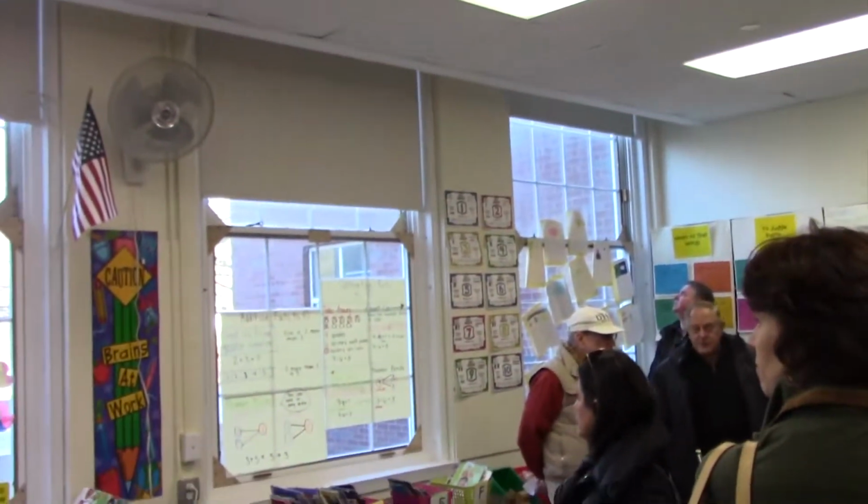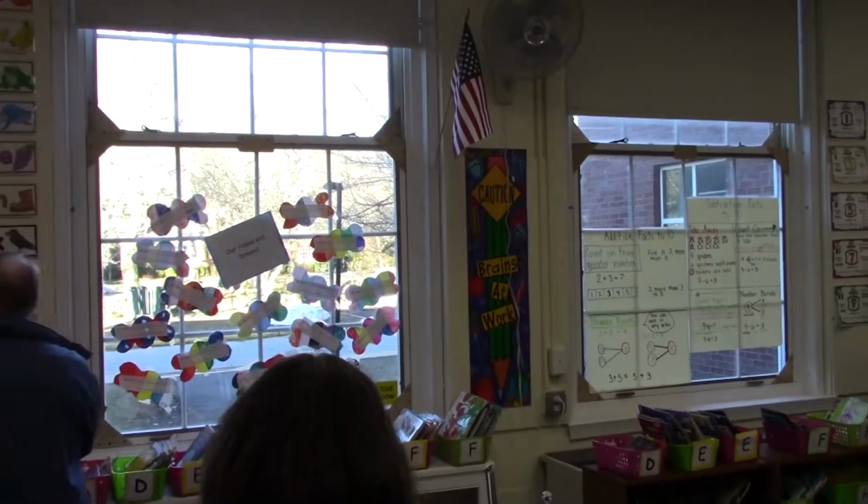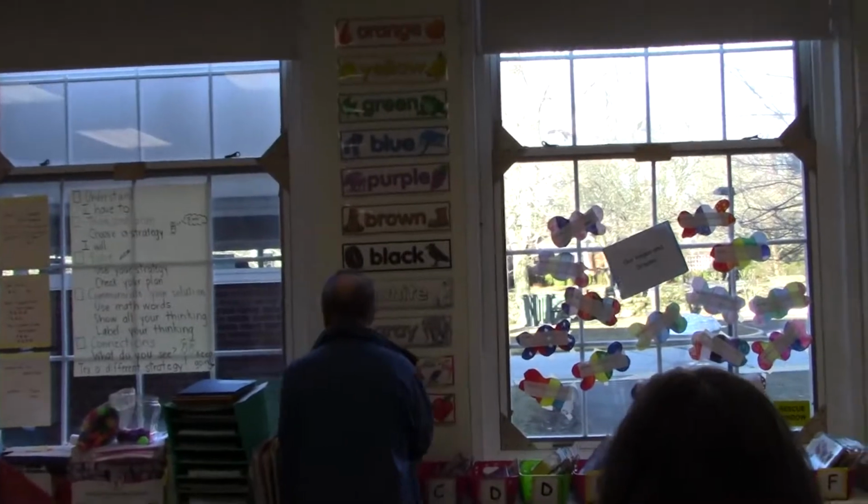Thanks. Okay. And these windows, just to point them out, in the other schools, like at Royal and Holmes, when they did the renovations in 1996, they replaced the windows. These windows were replaced about 10 or 15 years earlier. And they're scheduled, the job's been awarded, the shop drawings are in with the architect to get approvals, and there's no day camps or anything in this building this summer. We've moved them out, and the work is supposed to be done starting the day school ends.